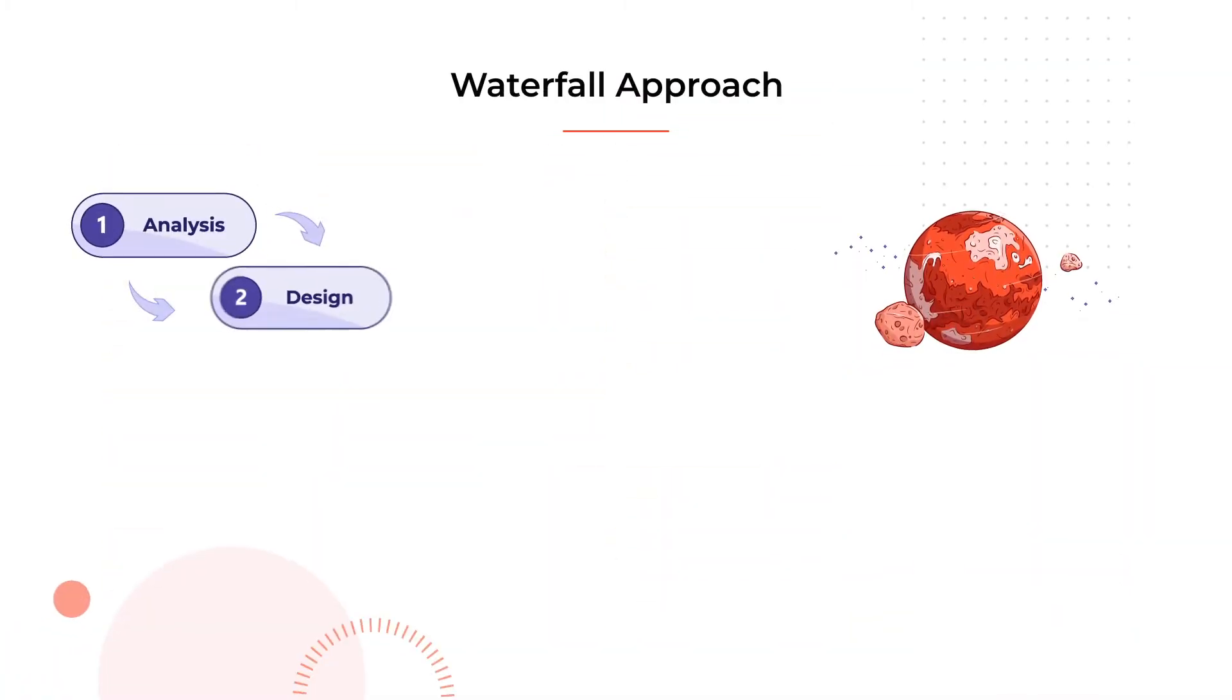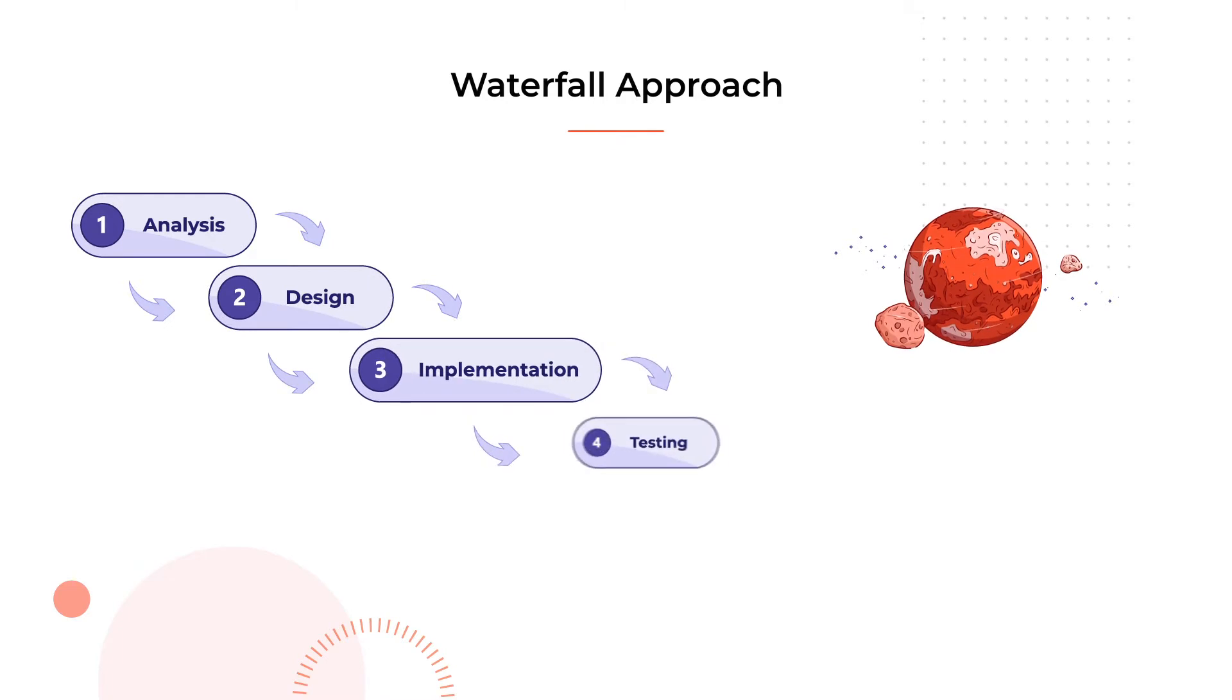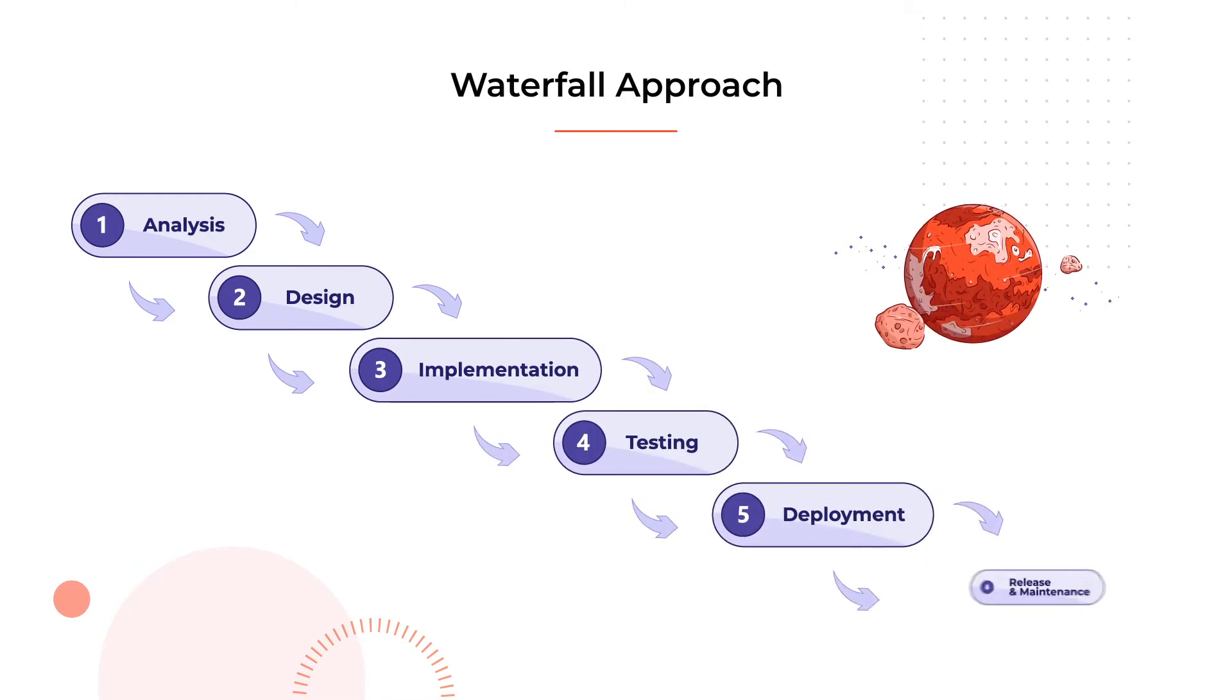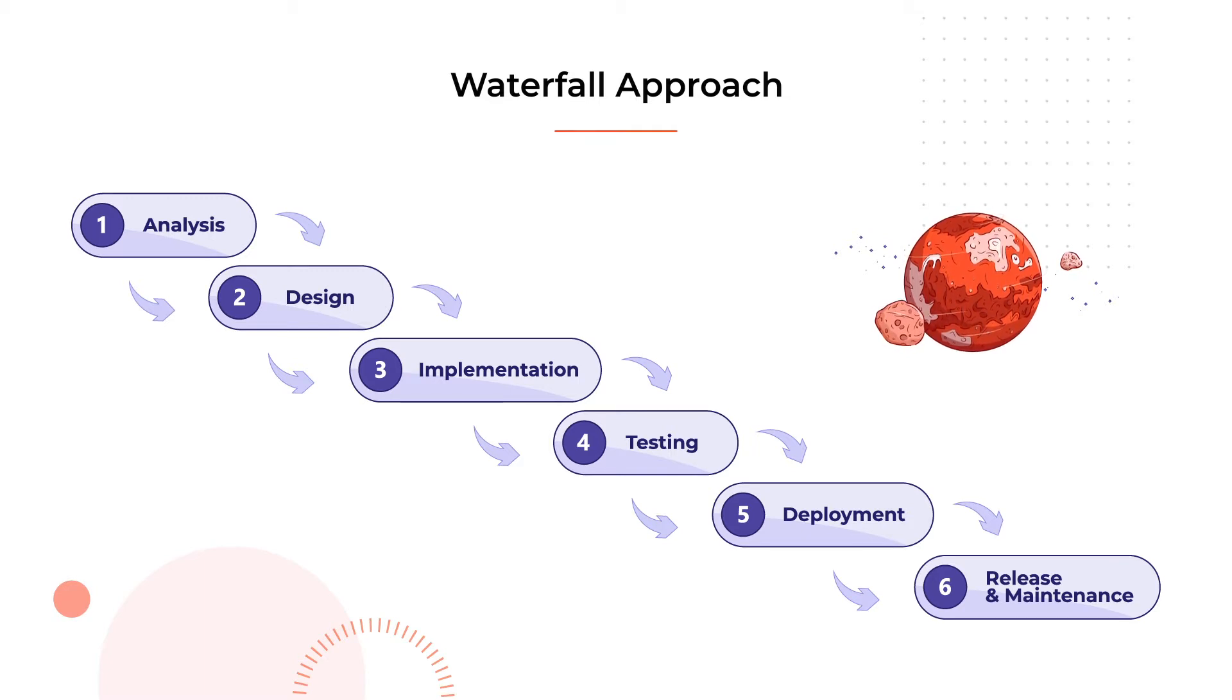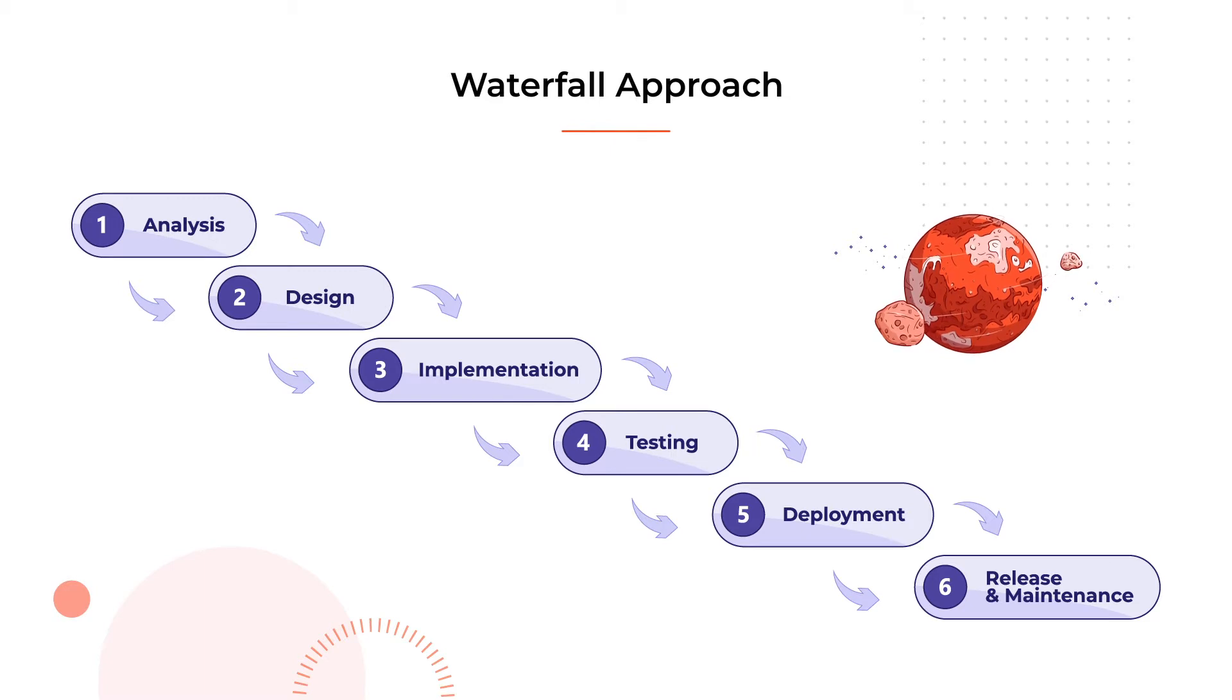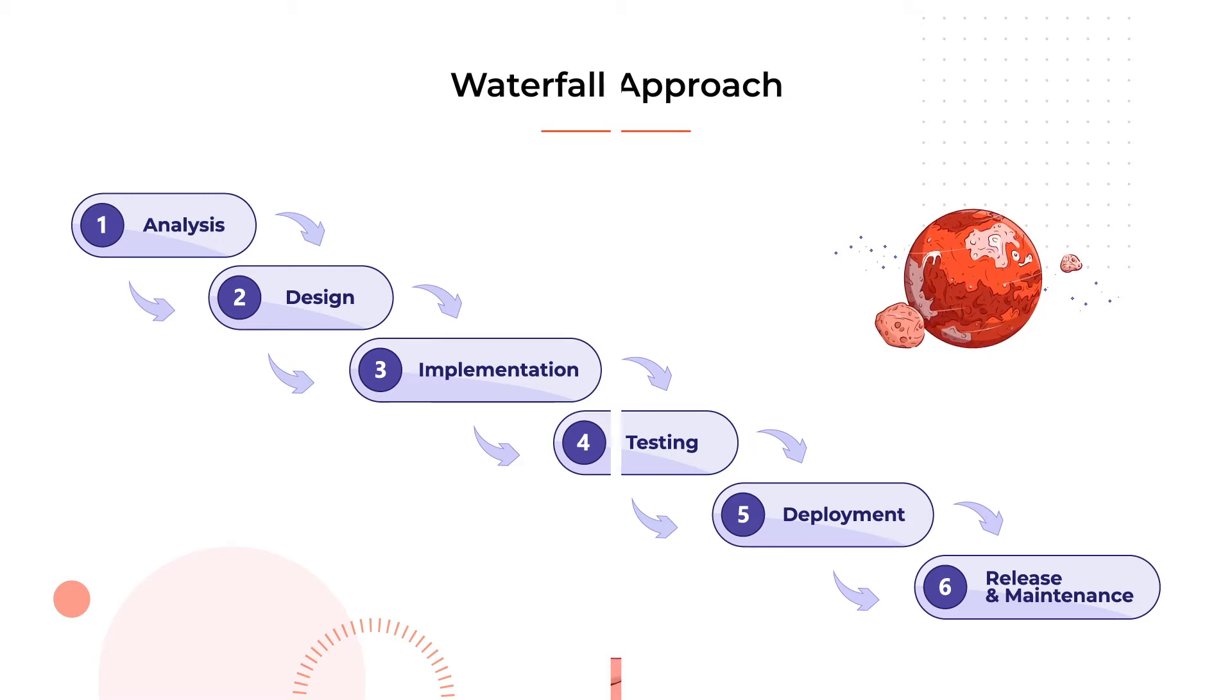The waterfall model requires that every consecutive step stems from the previous one. The whole process may take slightly longer, as each phase must be completed before the next one can start. The impact of possible errors is very strong. If something goes wrong during one stage, the whole team has to go back and fix it.